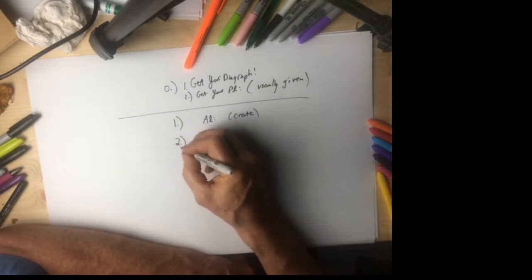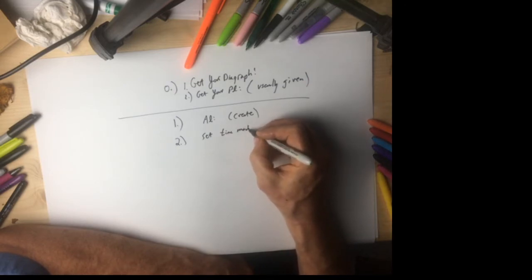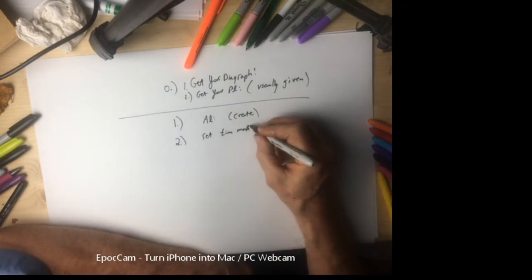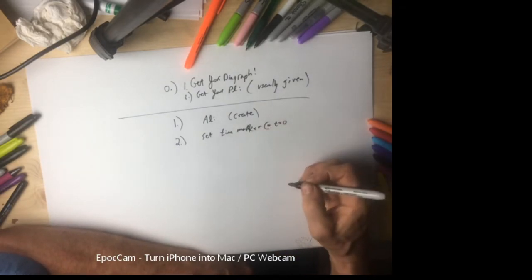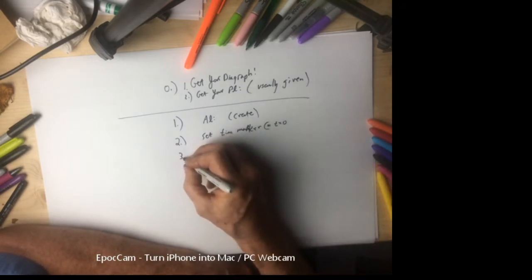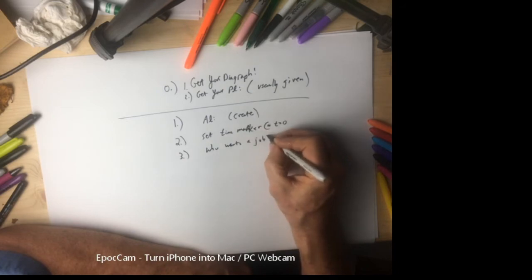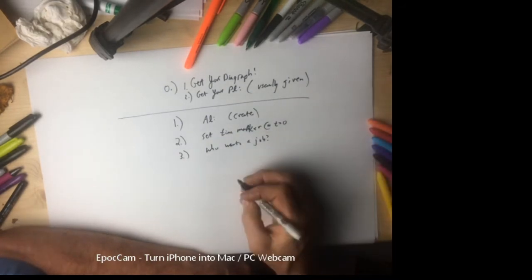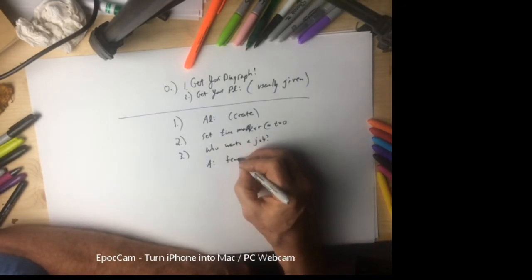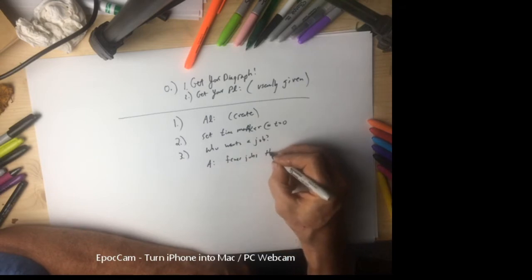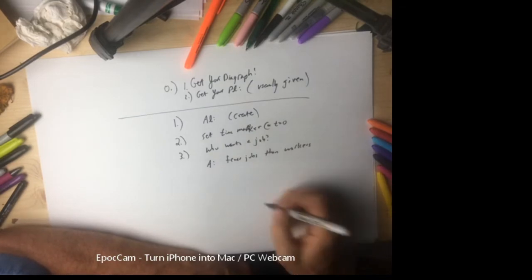Then the next thing you do is set your time marker at t equals 0. And now you ask, who wants a job? Now, the answer to that is if you have fewer jobs than workers at that time, assign them all.